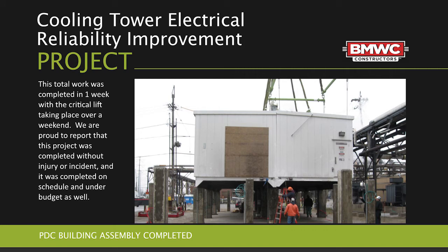And then how about the pipe racks just adjacent to it? Are those active? Those are also active. Those are process lines. We get within about 15 feet of those on the thick as well, which also makes sure that the crane capacity that we're using is the right crane. Obviously, you don't want that crane to go over, and if that crane goes over into those lines, you're specifically going to have some major problems.